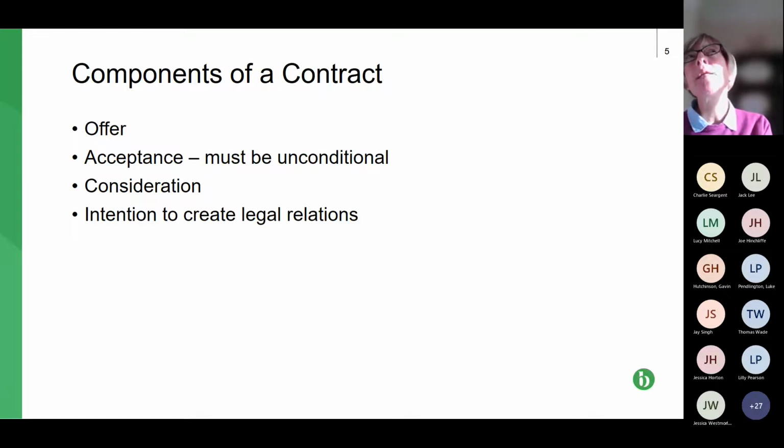Where this comes in practice is typically where work started and the contract hasn't been signed. Does a contract exist? Have the key terms been agreed? Very often they have, even though the contract hasn't been signed. So the important thing about offer and acceptance is to keep it documented. I appreciate the last bits of the contract getting agreed might be discussed over the phone.